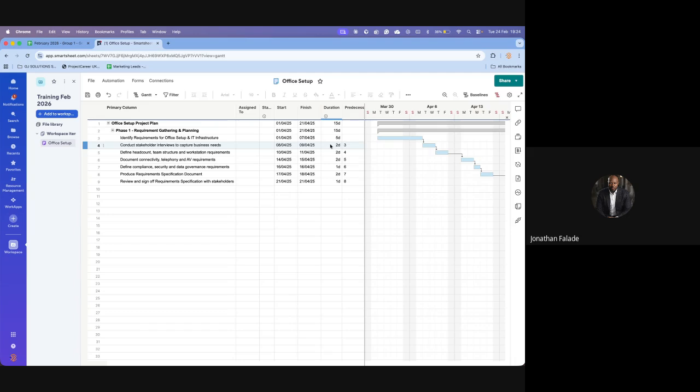So let's say now you're expecting some deliverables, maybe a vendor is supposed to send you something and they're running late, right? You could easily come to your sheet and say, you know what, okay, let me do a scenario, right? So what project managers end up doing is they will have multiple versions of the sheet.